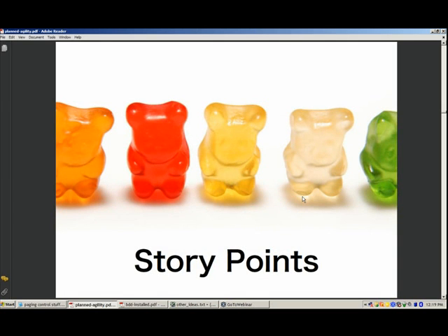When this meme was going around, these often were talked about as gummy bears, because a story point is just this ephemeral thing. It is a measure of a story in relation to another story. So you may have something with 1 point and 2 points. The idea is that the 2-pointer should be about twice as difficult. What is difficult? I don't know. As the 1-pointer. The point, I guess, with story points is that you'll ultimately end up with a scenario where there's an implicit understanding of what 1 means. And there's a notion that 1 fits into whatever our iteration size is.